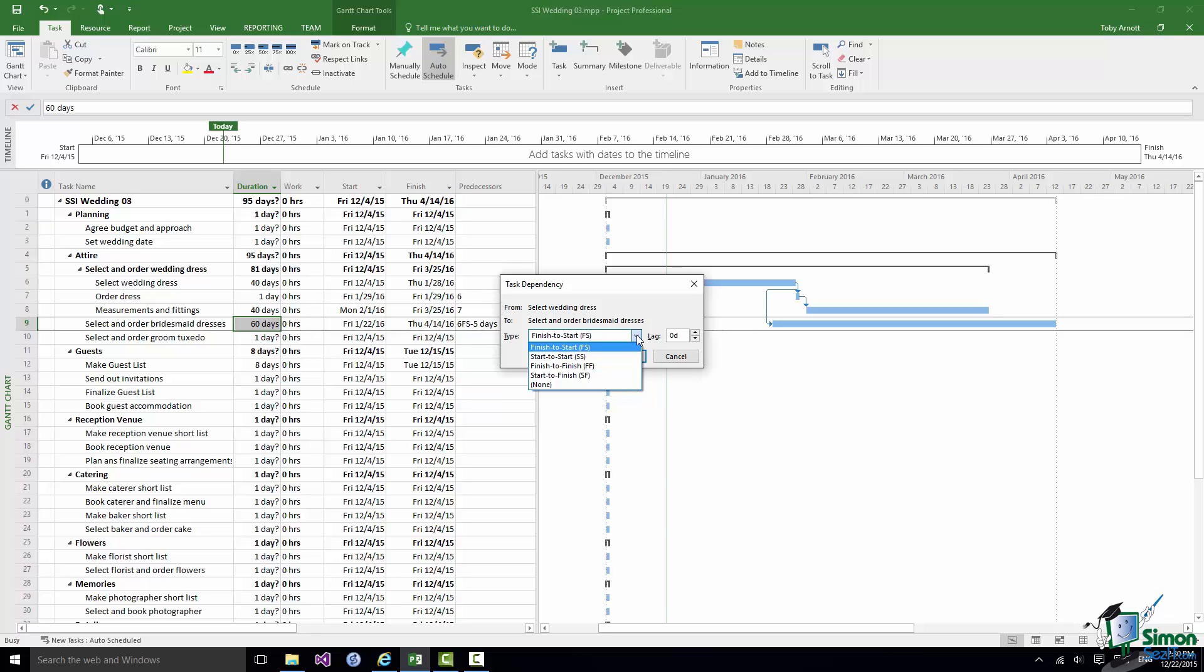Now by far the most common dependency is the Finish to Start but you are very likely to come across the others. And in the next section or two I'm going to show you one or two examples of these other types of dependency.